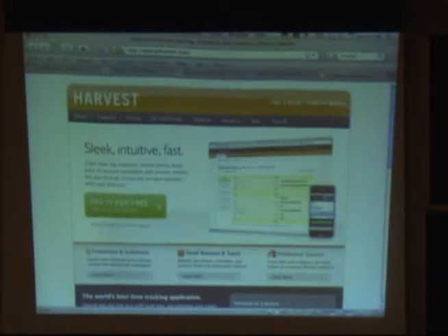We use Harvest. It integrates well with QuickBooks too, and we basically just use it to track time and send out invoices. You can set up estimates for projects, by task, by person, whatever, so you can see how much you thought the project was going to take. It gives you a nice little bar, and you start to sweat as you approach the end, and then watch it go over. It is useful, though, to constantly refine and recalibrate your estimates.